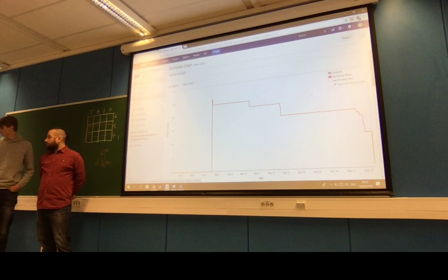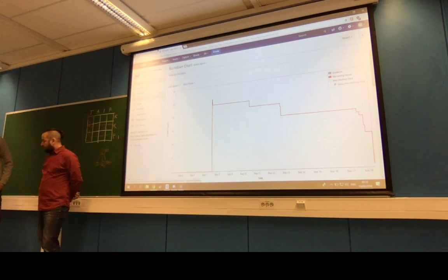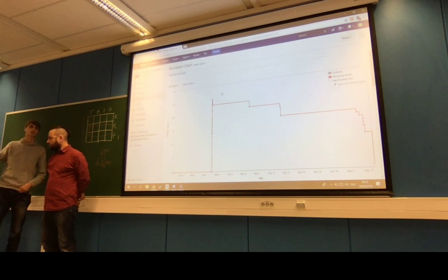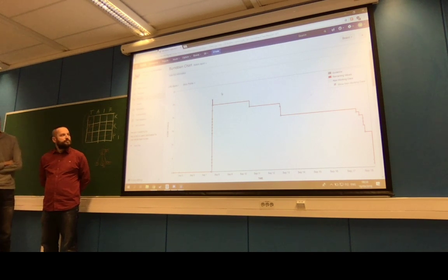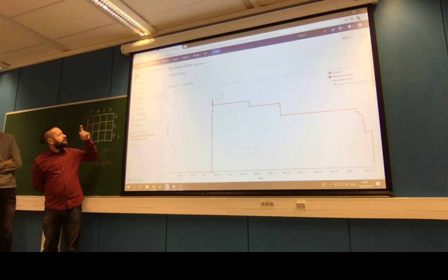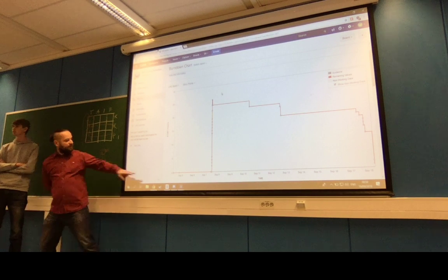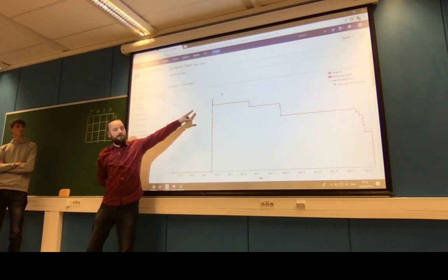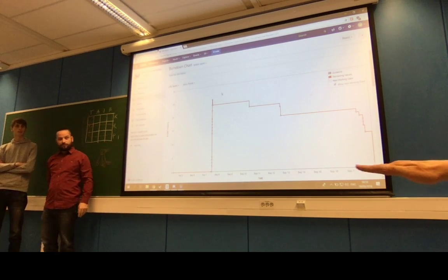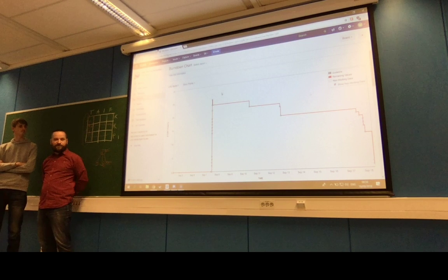We also would like the guideline to show, because we didn't get another shot. So it doesn't show the line that we should follow. Oh, I see. I'm not really sure what happened, but that happens when you don't have any. Yeah, because it started with zero at the beginning of the sprint. And then we gave estimates in the middle of the sprint. Yeah, exactly. So your line is flat on the bottom.